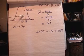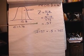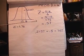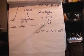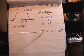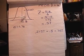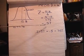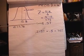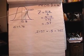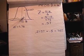Well, what's the probability, then, if that's the Z? Well, you can go to a textbook and look up in a Z chart, or you could probably also go to Excel and look it up, and find out that the Z, the probability associated with the Z is point two one five seven. Typically, in the textbooks, they'll show you this area here associated with that Z. You find the 0.57 in the Z chart, and that where it intersects will give you the probability to point two one five seven.